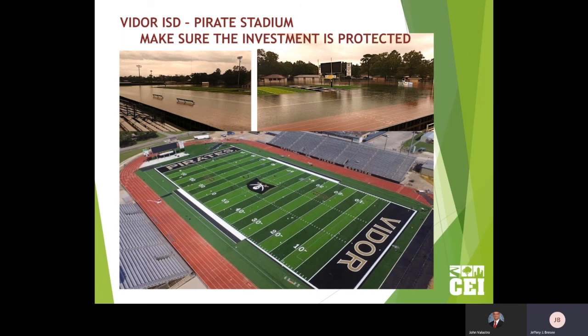So in Vidor, we did all of this for them, and I didn't know this was going to happen, but after we did the structural base for them, we solved a lot of groundwater problems. We made sure that it had a geotextile. Key to this system that we use is making a breathable system with a fabric instead of a liner. We even designed the turf to be a little different to survive underwater. We handed them the finished project, and we hoped it really wouldn't ever be needed. You never want something like that to happen.